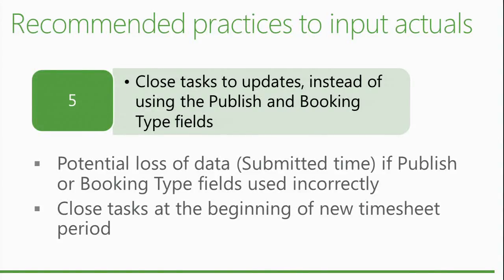But this flag is really to prevent the assignments from showing up in PWA. If it's not published, it means it doesn't show up in PWA. That's all it means. So you can hide things from the user in PWA by switching this flag, publish and not publish, okay?